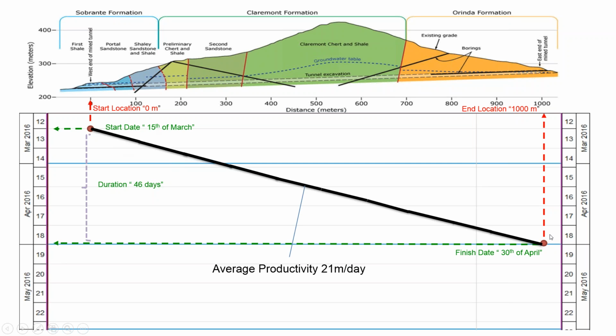This is the situation where people generally think we can have the same performance, but why do I use these colored mountains? First of all, many people understand that the soil type is different here. Each color represents a different type of soil. And if we work in tunnel construction, the TBM machine will make productivity based on the soil types. If it is an easy area, we can do more. Let's see how it will look in the graphic.